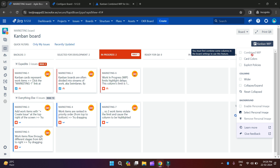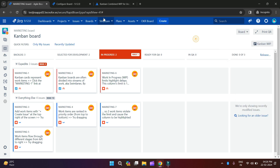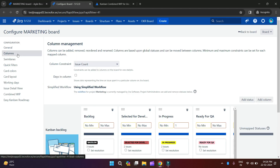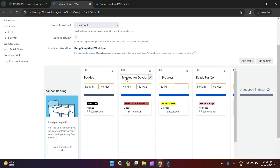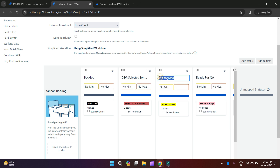We will start with the combined WIP — how you can combine columns in your Kanban board. For this, you will go and click on Configure, then go to the Columns. In the columns, what you have to do is prefix the column name with a name and a symbol. Like this — I am giving the name 'dev' and making the prefix.